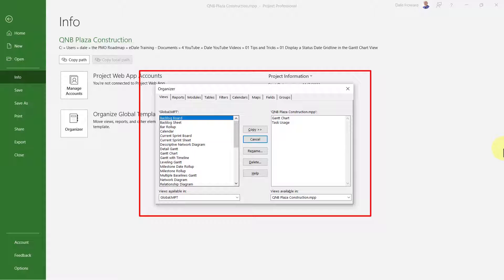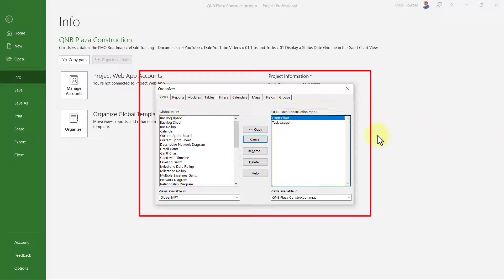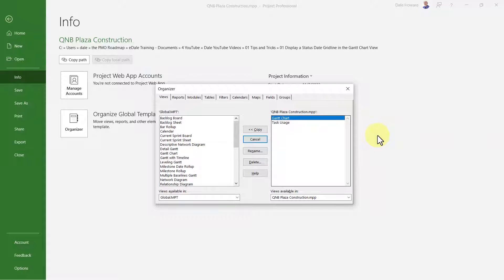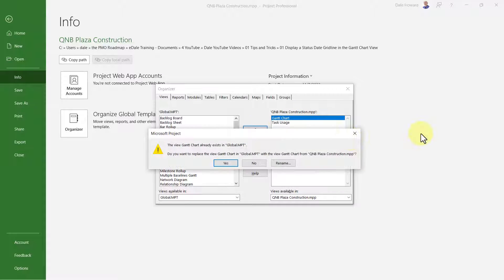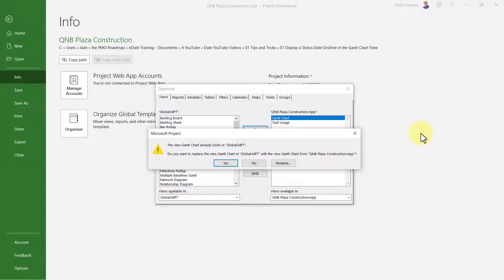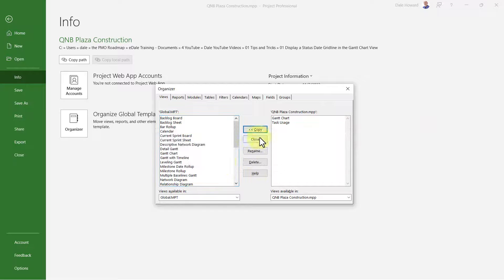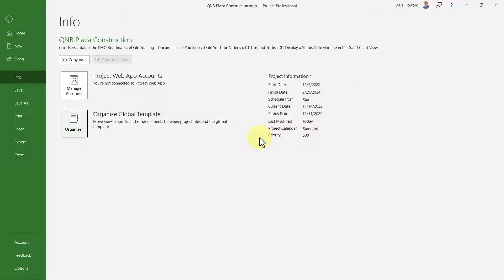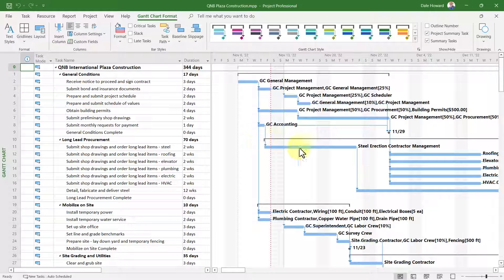In the Gantt chart view on the right side of the dialog, in the active project I currently have open, there's the Gantt chart that does display the status date grid line. So select the Gantt chart view on the right side of the dialog and click the copy button. Microsoft Project will warn you that you're going to replace the Gantt chart view that doesn't include the status date grid line with one that does. So click the yes button, then click the close button, and exit from the backstage.